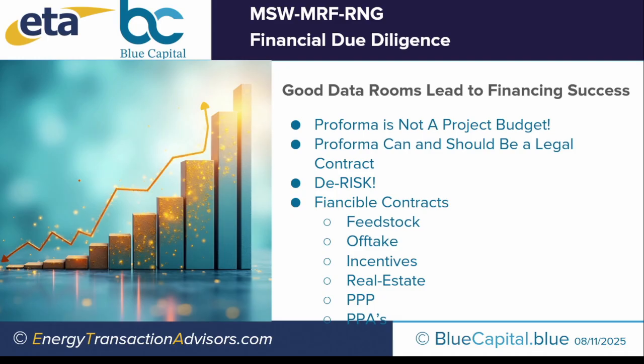De-risking financial contracts. When you think about a financer and you think about banks, the main thing that should be in your head is, have I de-risked this? That's it. That's all they're looking at: what's the risk, how volatile is their money that's going out, are they going to get repaid? They want to be repaid in 5 years, that's pretty common. If it's longer than that, it's kind of a red light to them.